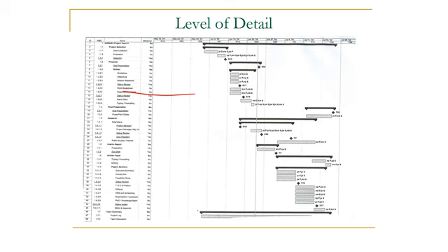All right. So I've got this baseline at the top. Here's the length of the project that we expect. Here, task. And I've got a time estimate, how long it takes to do that task. And if it's filled in, I've completed that task. At some point, I might want to do a status line, and that's kind of here, and see where I am.